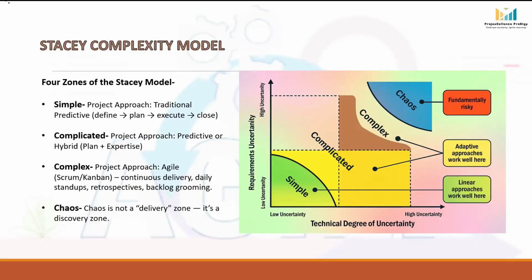So in this situation, the first step is damage control. Shut down the system, secure the network. Then with more clarity, the team can explore solutions in small iterations. So the project approach in this case should be: in phase 1, immediate crisis response. And in phase 2, when one axis is known, transition to an agile or incremental approach to recover the systems and roll out fixes.